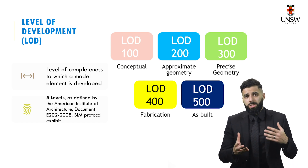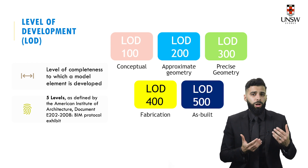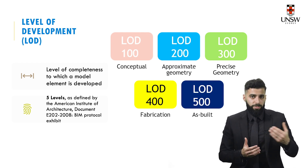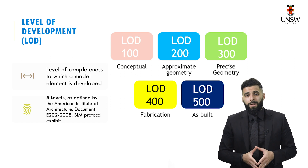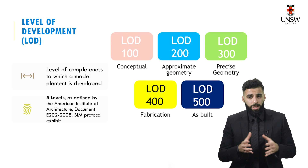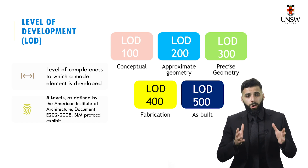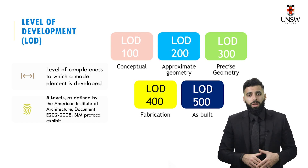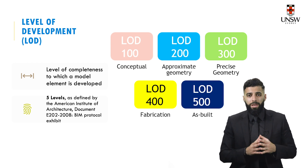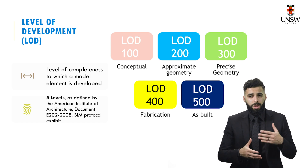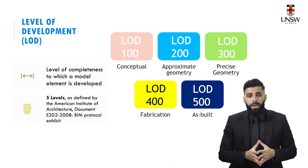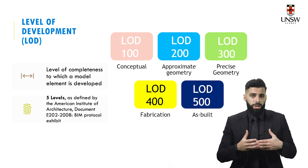An important concept in BIM is LOD — Level of Development. It indicates the level of completeness to which a model element is developed. There are five LOD levels as defined by the American Institute of Architecture in document E202 (2008), known as the BIM Protocol Exhibit: LOD 100 for conceptual designs, LOD 200 for approximate geometries, LOD 300 for precise geometry, LOD 400 for fabrication-ready models, and LOD 500 as the as-built model.